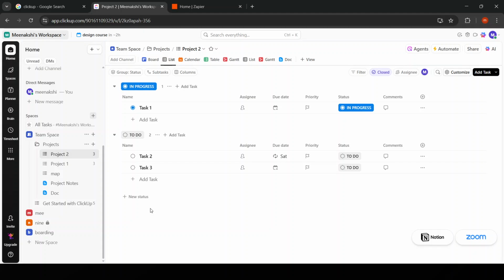For those choosing CSV, familiarize yourself with the correct format. The CSV file should have columns labeled for each element of your data, like task name, description, due date, etc. Before uploading, it's a good idea to double-check your file to ensure that everything is in order, avoiding any potential issues during import. Go ahead and click on the file you want to upload.